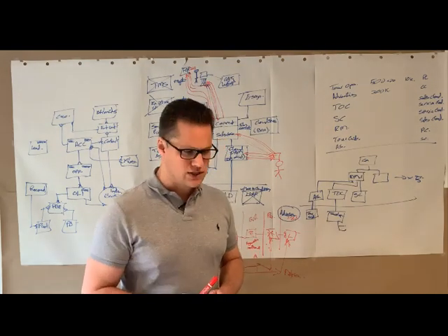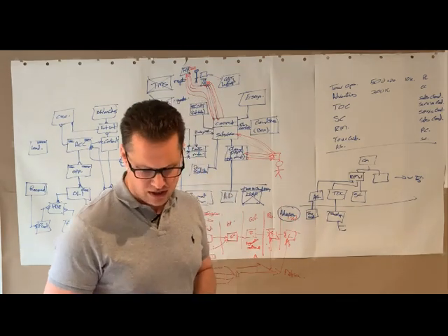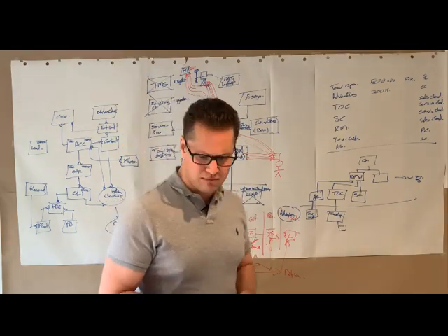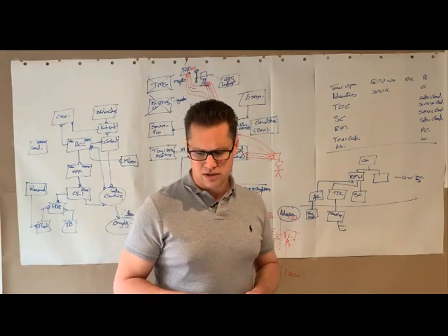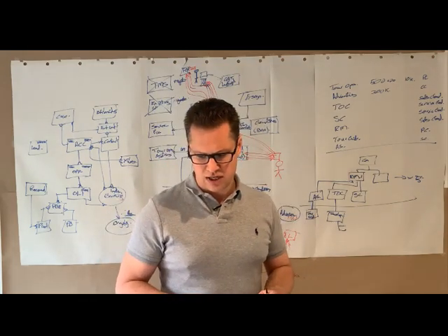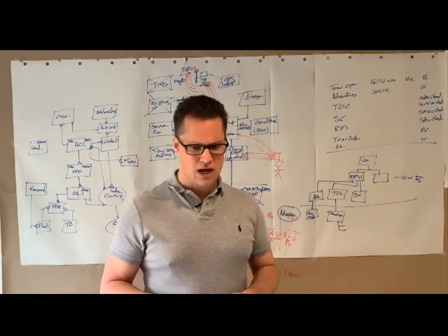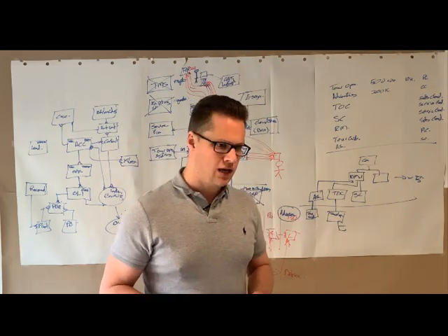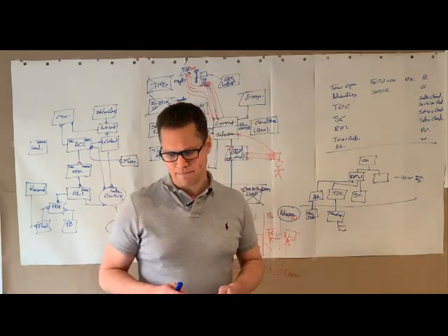So certainly the siloed nature of the current operations is a concern. We have the internal IT and the external IT, along with a PMO and a security team. I think we're going to need to make sure that we get top level buy-in to, if not change this structure, certainly augment it with an agreed steering committee and certainly an architecture review board in order to make sure that technical design choices are centrally governed.